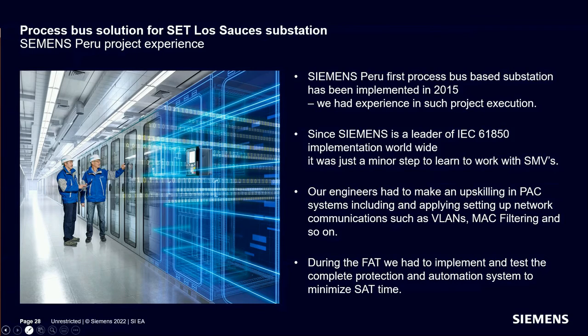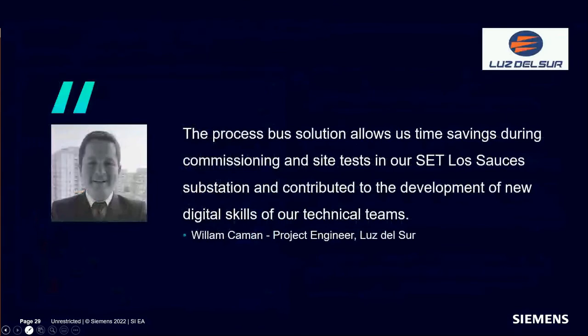During the FAT, what we recommend is to implement the whole test of the protection and control system in order to minimize the SAT tests. Please, the next slide, Andrew.